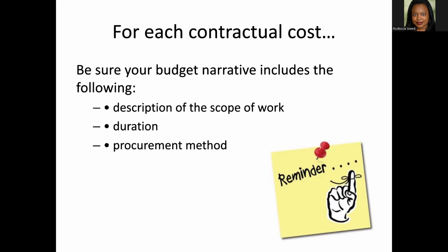You'd have 30 days to submit a proposal, and then there would be a selection committee that would review the applicants and select based upon the lowest cost to get the activity done that meets all the requirements of your proposal. If we had costs under $20,000, the county's policy was that we get 3 independent quotes and select the lowest cost unless there was a justification for a higher item.